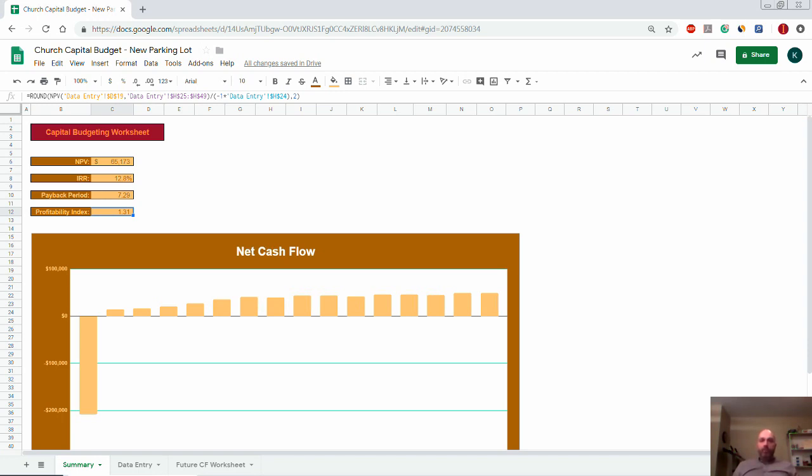But probably just by listening to that obviously, barring something really exceptional, the preferable project is the $10,000, the one that costs $10,000, okay? Because it's earning 100% return. Whereas $1 million earning a tiny little fraction, whatever it is, 1% return. Okay, so it's the profitability index that does that, takes into account not just the net present value, but what you're spending to get that net present value. Okay, the initial investment.